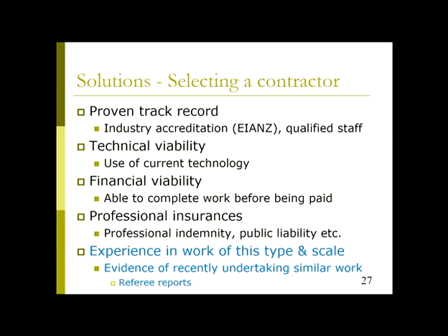And probably they're going to have qualified staff working for them as well. You need to check that they're technically viable, they're using current technology, and financially viable, they don't have a large amount of outstanding debt that they're carrying on into your project. They have all the professional insurances that they need so that if anything goes wrong, such as a failure of the project, a building collapse, or somebody's injured and there's legal action that involves them paying, they need to be covered, have the professional indemnity and public liability insurances to ensure that they're not financially destroyed by these events.